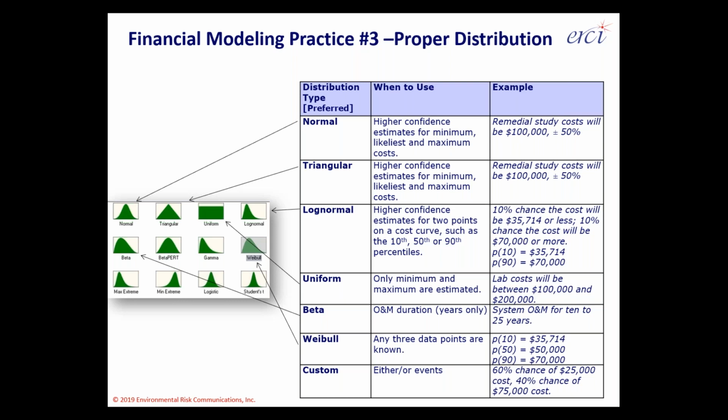And what happens with constructing a Weibull distribution is the Monte Carlo modeling software, whether it's @RISK, SIMMath, or Crystal Ball, those are the three most common tools out there in 2019, gives you a sense of the interpolation and extrapolation of values that are the P15 or the P55 or the P99. Those values pop out because the software uses the arc of those three data points to construct every other value from the 0 to 100% range of outcomes.